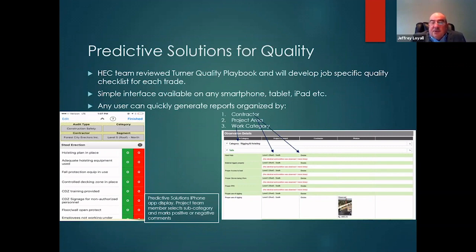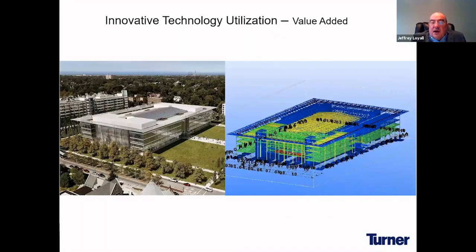On the next slide, on the left side you see the rendering of the building. On the right side is all the structural steel that was required for that building. The areas in green were approved by the structural engineer and the fabricator of the steel through a shop drawing perspective, and we did that all electronically.